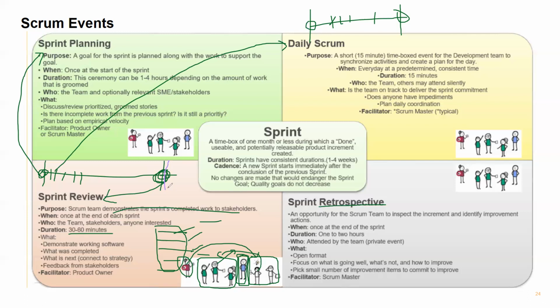That means today evening you complete the sprint around 5 o'clock. Maybe at 6 or 7 o'clock, based on your availability and your team's decision, you will complete that retrospective, and tomorrow morning you will start your sprint fresh. You will have some action items and improvements identified, and you will try to improve those items in sprint 2, and again retrospect and implement action items in sprint 3. There are continuous improvements happening.